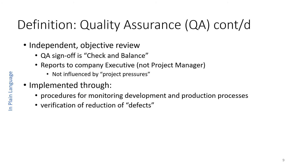The quality assurance process should typically be implemented as an independent objective review. The quality assurance process reports to the executive of the company, not to the project manager. Projects are under strong pressures to get things done quickly, make schedule, and stay under budget — and quality assurance can work against those pressures. So quality assurance typically reports to executive management, providing checks and balances for the whole enterprise.